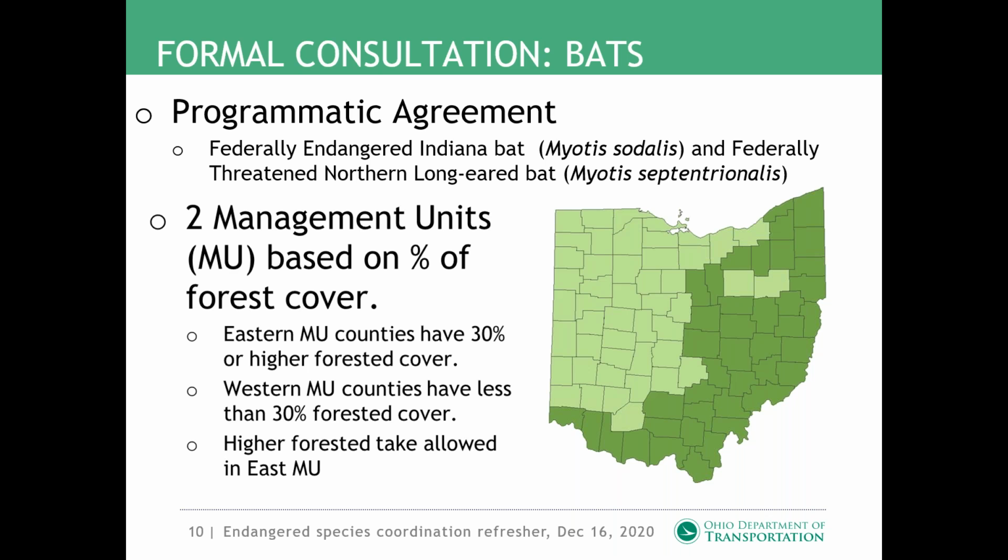It implemented a batch concurrence consultation approach, where Fish and Wildlife Service already agreed that many of our actions have no adverse impacts. So they didn't require analyzing those projects individually. Things like our culvert replacements, they didn't want to see every culvert replacement because it's very unlikely that we're going to impact the species with those. The batch coordination decreases our coordination efforts to 14 days. So this happens very frequently.